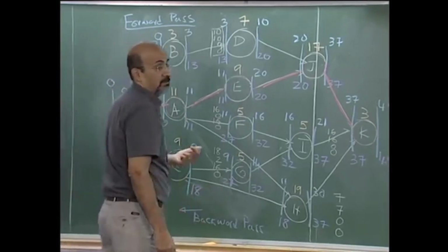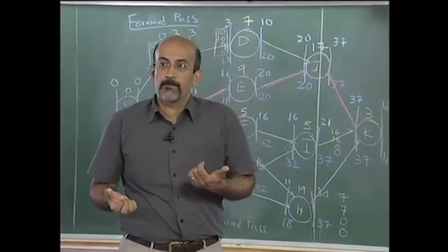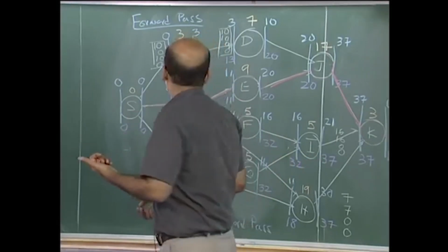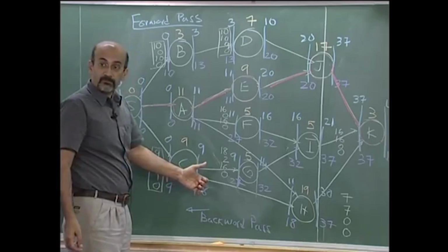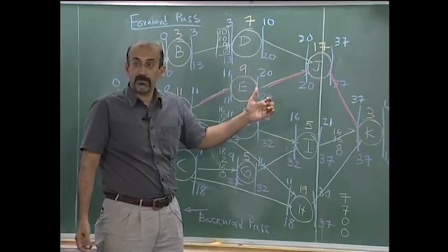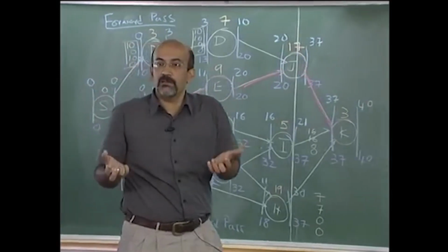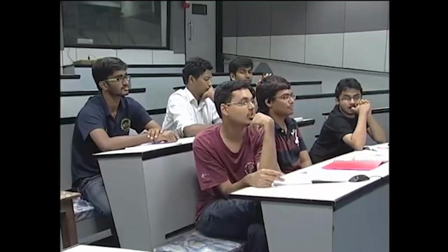So how would we physically interpret it? It's even more negative than the duration, which means I cannot afford C to go to the latest and I to start at the earliest. That would be the most general interpretation I could come up with. It doesn't show up as a critical activity either. That's an important thing. So in fact that's interesting.